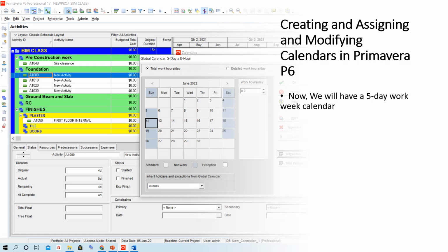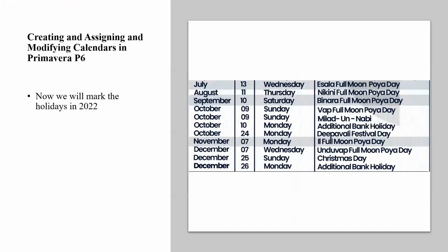So in this calendar, definitely please include these holidays. That's the main item. Other things we can get from the default calendar also, but for special occasions, we have to mark these days as non-working days, because we are going to follow the Sri Lankan calendar for that 2-story building for the next 6 months. So better to include these holidays.